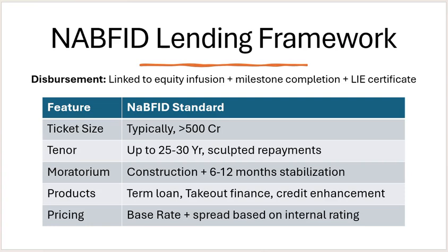Let's move on to the next slide, guys, where we are going to discuss the NABFID lending framework. How will the NABFID lending framework typically look, and what are the key things in it? The disbursement is linked to equity infusion, milestone completion, plus the lender's independent engineer certificate. This way the distribution of the funds will happen. Then the features and the NABFID standard.